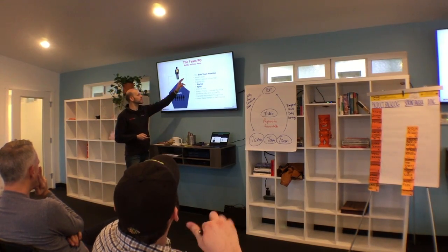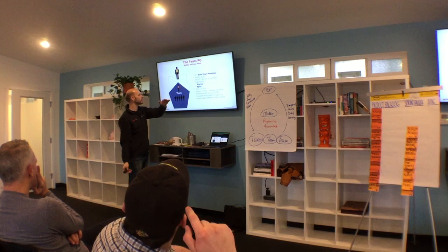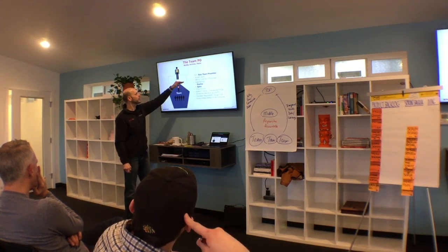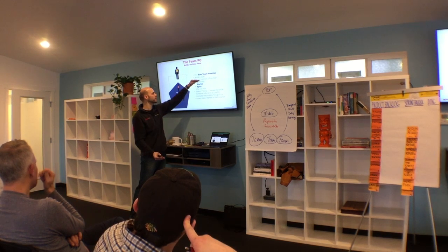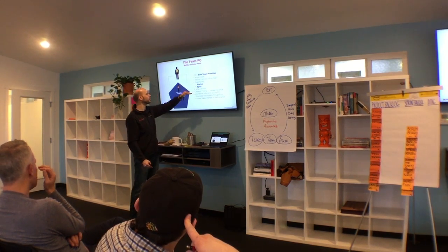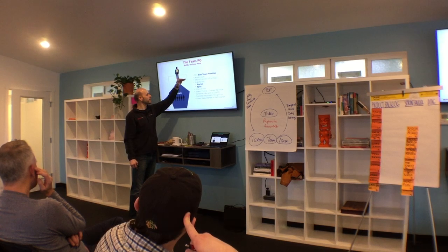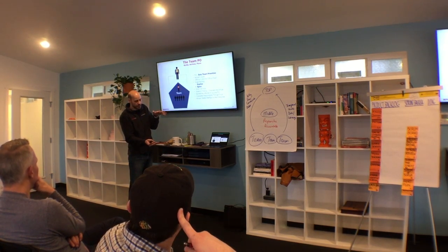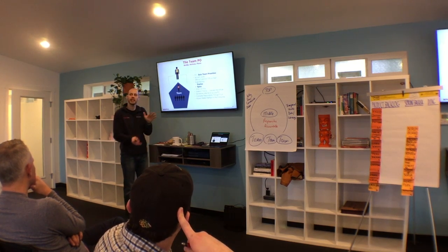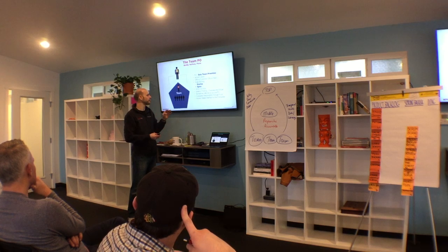The product owner sets the team priorities by prioritizing the backlog. They're a servant leader. They spend half the time with the customer, the stakeholders, regulatory compliance officials, half the time with the team doing the work. They have a single backlog. There's big chunks, which we can call epics, and those chunks are split into smaller chunks. We can call them stories. Same thing, just big and small is all I'm trying to differentiate here.